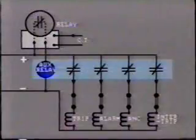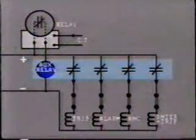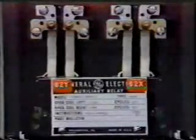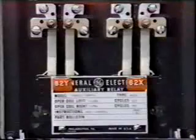In many cases, the relay output energizes one or more auxiliary relays, each of which have multiple contacts. In this situation, there would be multiple output functions to check, either by observing the resultant action or alternatively by measuring the output signal to each function. Each auxiliary relay should also be tested for operating time and reset time to make sure that it complies with